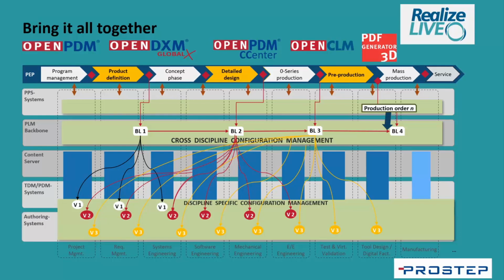And again, you can take another snapshot, and so on and so on and so on. So the idea is to understand that as your project grows, your level of information will grow. And in order to understand the decisions that were made, taking these baselines will provide you that supporting information.